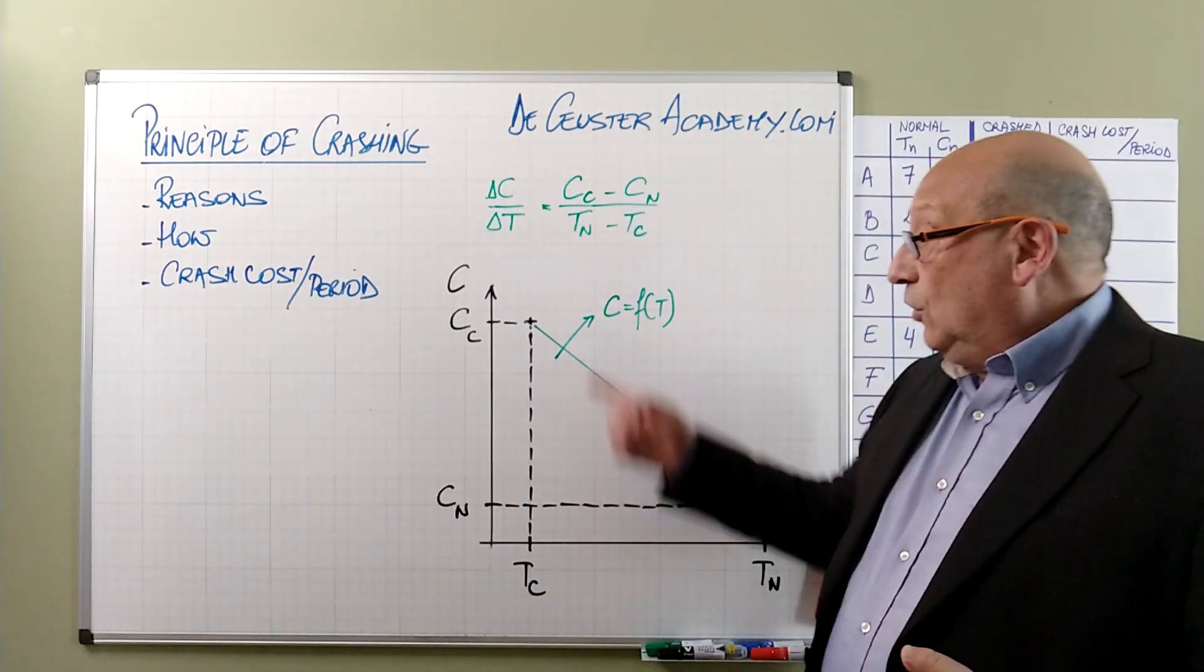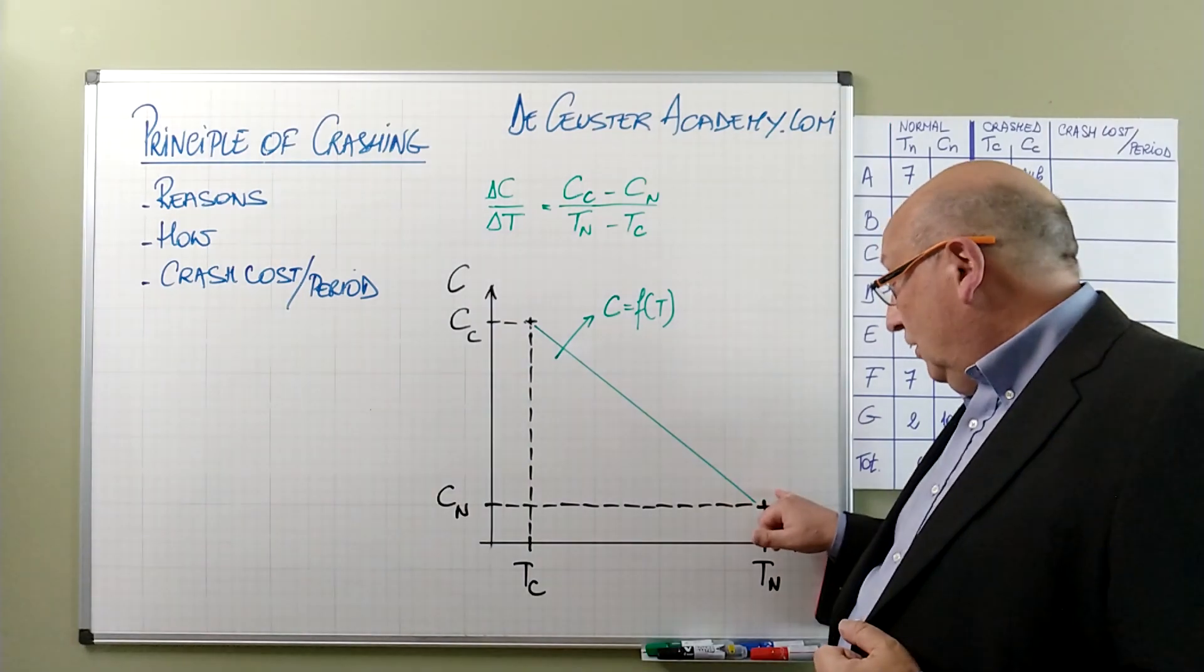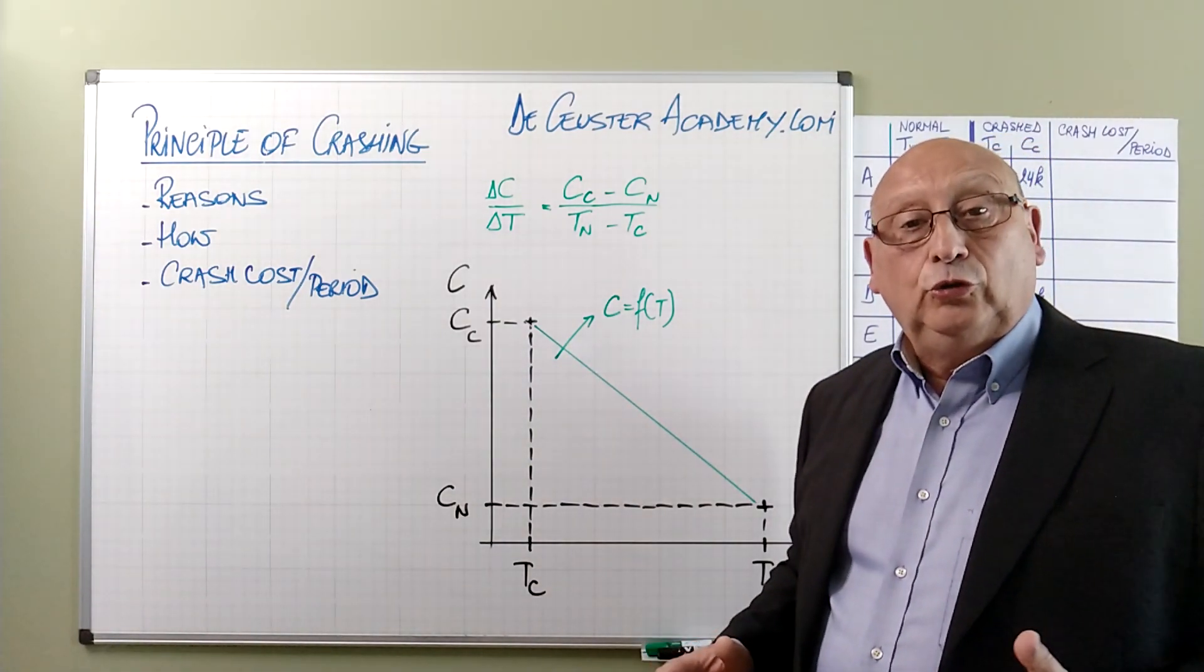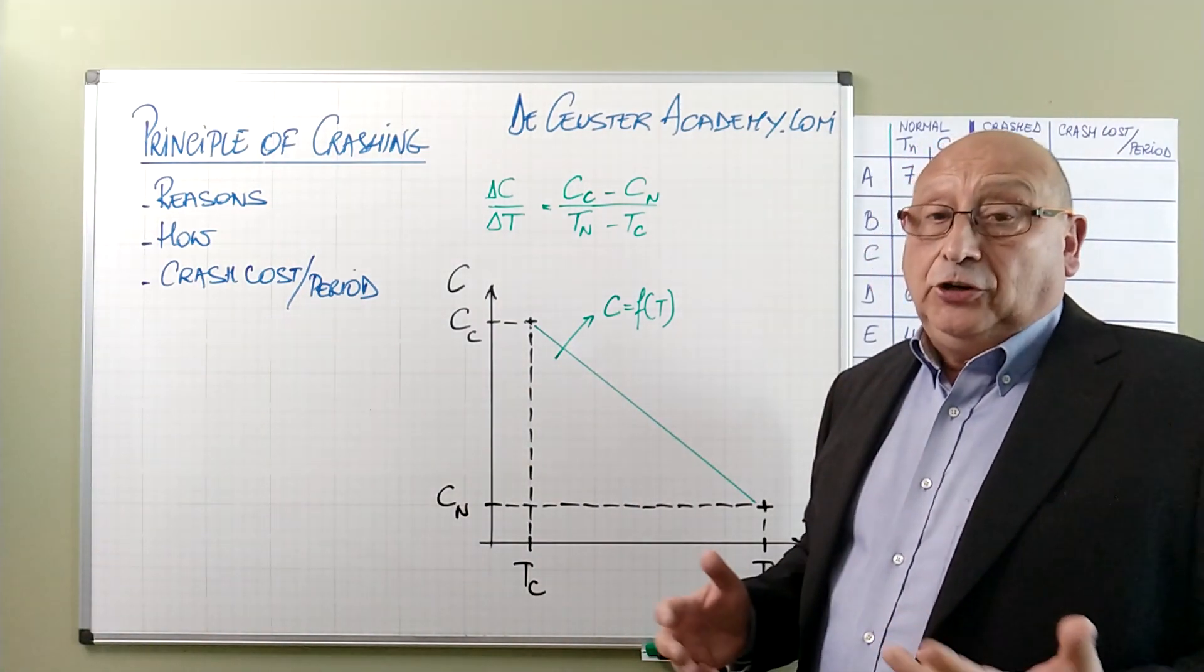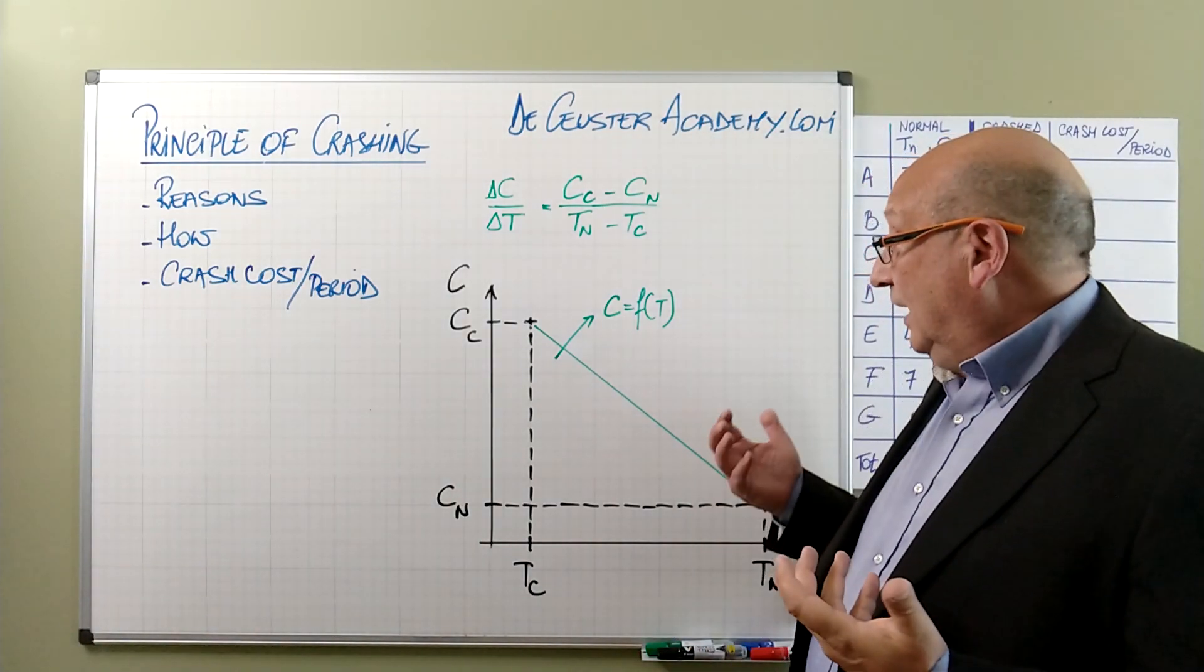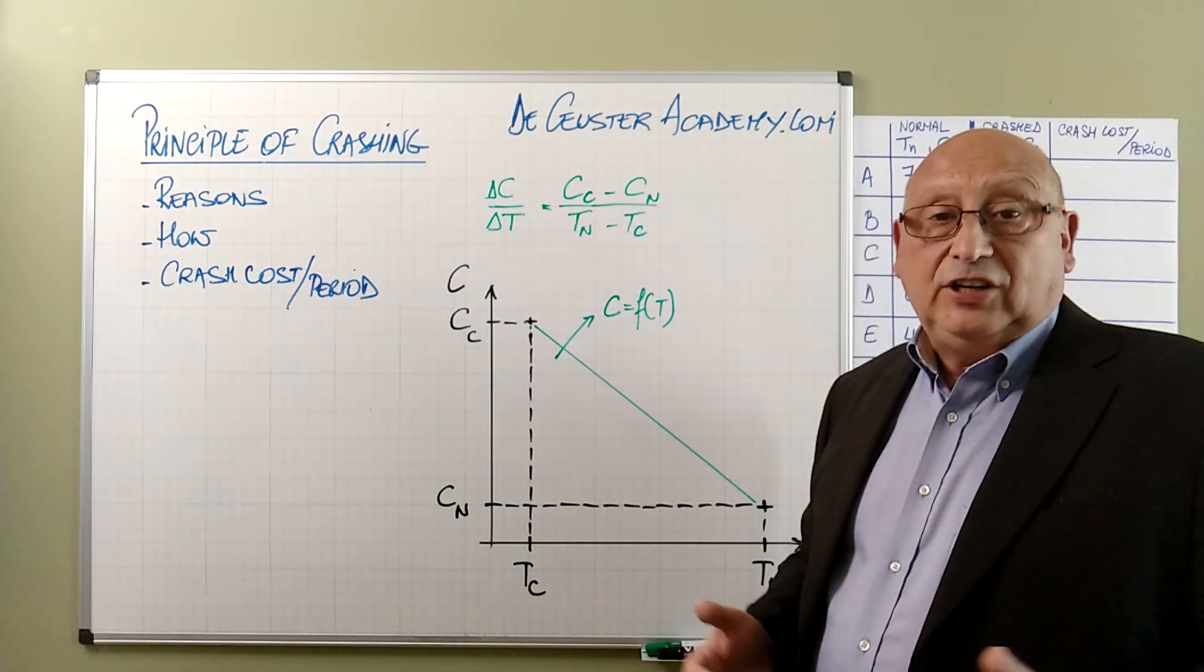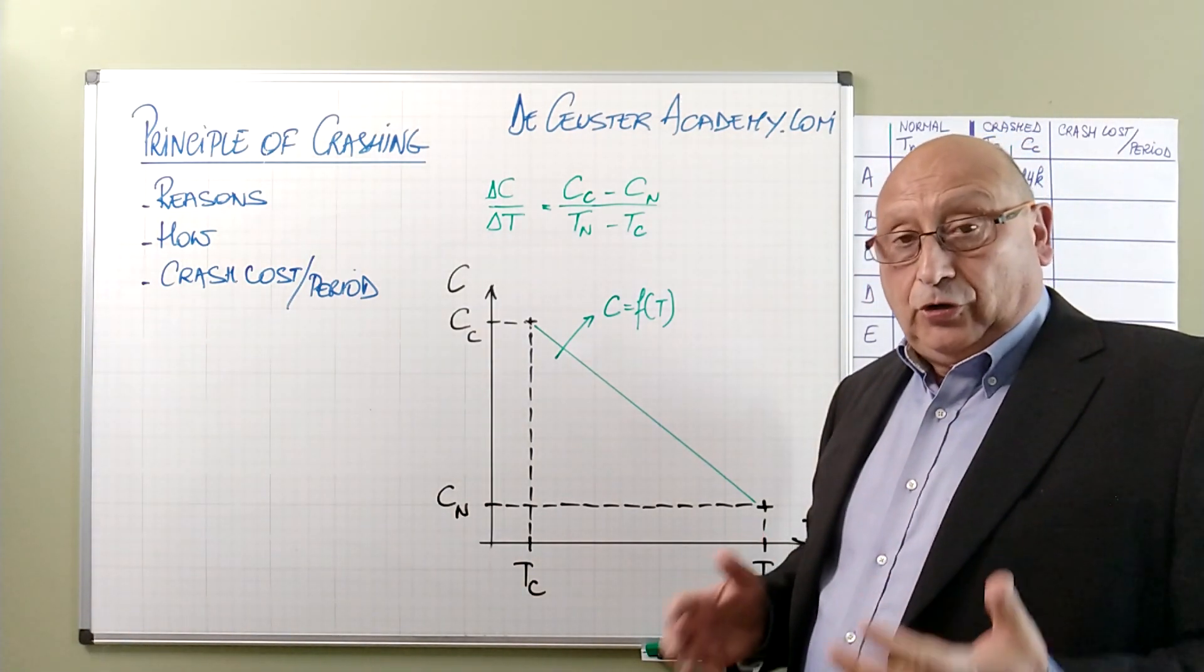So when we have the normal duration with the normal cost, we have the crash cost and the crash duration. The evolution between the two is linear. It's not necessarily true, but it is an assumption that will help us to get an easy calculation. The linearization of the problem makes it for us a lot more interesting and easier.